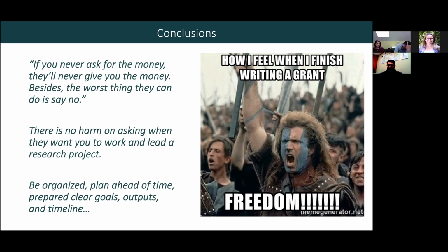No, that's too early. But for example, the university has a 1 week policy. You have at least your budget set and your budget justification. You don't need to have your full proposal ready, but you at least know your project. What are you planning to do? With a budget, you know if you're planning to use 1 student, 3, or a postdoc.